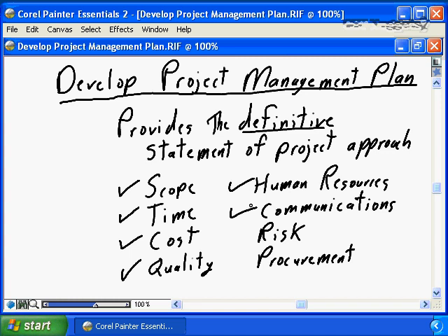basis. It's going to identify that you need to provide very high-level project information to the complete stakeholder community on a quarterly basis. It's going to define all of the approaches that you're going to use to manage and effectively disseminate project information to the stakeholder community.